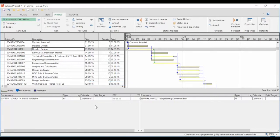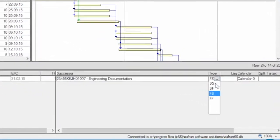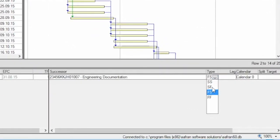The sequence in which activities should be carried out is represented by relationships or links. In Saffron Project we use the term 'links' for logic, and a link can either be a predecessor or a successor. Saffron Project has four types of links: Start to Start, Start to Finish, Finish to Start, and Finish to Finish.